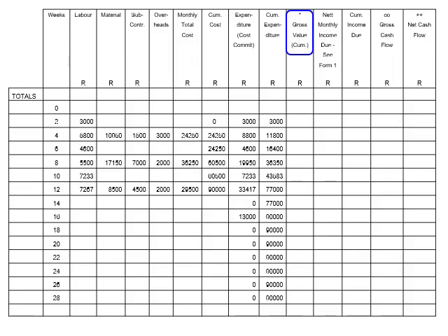These periodic payments usually occur monthly, and the amount to be paid is based on measured work completed at the end of a month. Thus, value, relative to construction, refers to the amounts to be paid periodically until the project is completed. The term gross value refers to an amount before any adjustments, usually deductions, are made to it. That is why the document that certifies the amount of work completed is referred to as a valuation certificate. By means of this calculation, we determine the gross value of work done, before adjusting the amount to be paid.